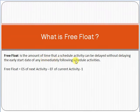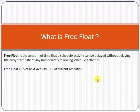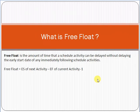Now, what is free float? Free float is the amount of time a scheduled activity can be delayed without delaying the early start date of any immediately following activity. Simply put, free float tells you how much you can delay a current activity without impacting or delaying the next activity.